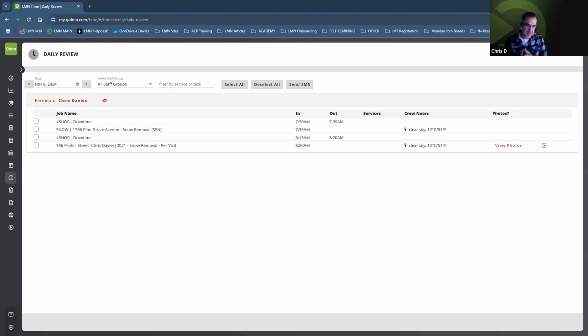So in your accounts, you are going to be creating what we call a shop job, okay? So it's unbillable, number one, because you're not billing your customer for it. This could be things like loading and unloading a trailer or a truck, or maybe doing some mechanic work, fixing some equipment, whatever the case might be. Or you can set up a shop job for office staff, maybe when they're doing invoicing, when they're doing estimating, and so on and so forth. But you're going to create a shop job in your accounts manually, or create it from an estimate, but you really don't need to.